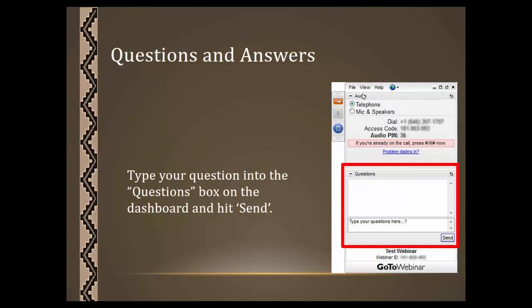We also have a question, how are objectives and outcomes different? Objectives are overarching statements. An objective is typically in the, like I said, the SMART format. And it would be something like by the end of 36 months, we will have increased language fluency in 15 participants by 1 fluency level.